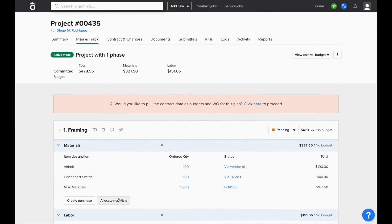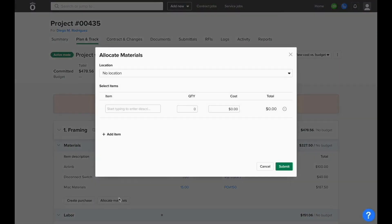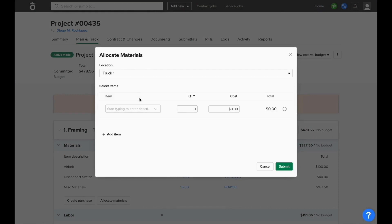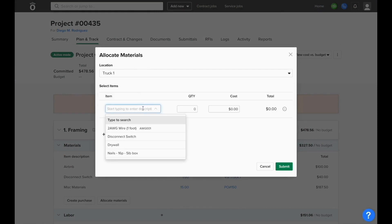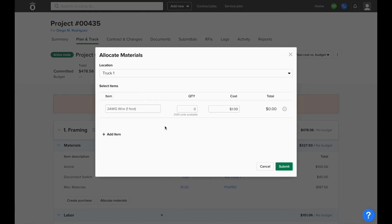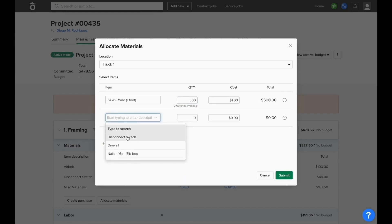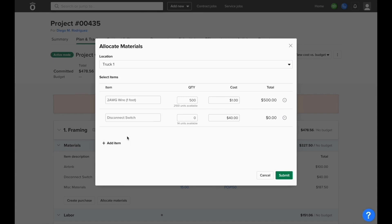We also have the ability to add materials from inventory to a project plan directly from inside the project plan. We can choose the Allocate Materials option, choose our location, and what items from that inventory location we want to add to the job. This also allows us to define the cost per unit that we want to apply to the job from this inventory allocation, and if we need, we can add multiple items from inventory at a time.